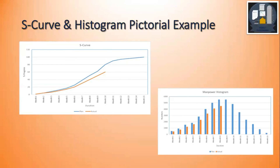One thing to note is that the blue line may represent the early dates baseline, and there may also be a late date S-curve — which is not shown — that may be below the orange curve. If so, it would mean the project is actually within schedule. However, generally when the actual curve is below the baseline curve, we say it is behind schedule.